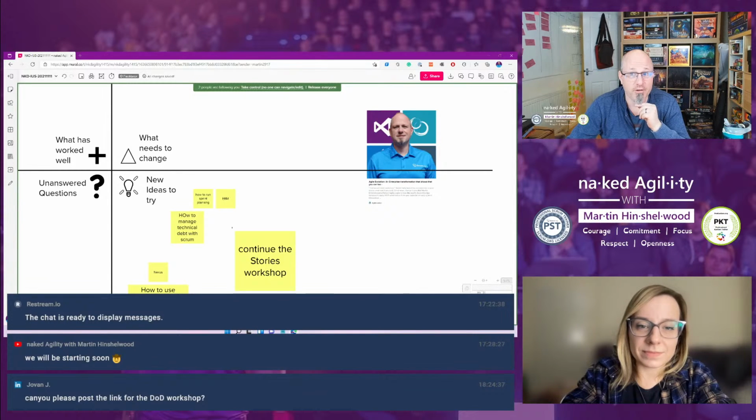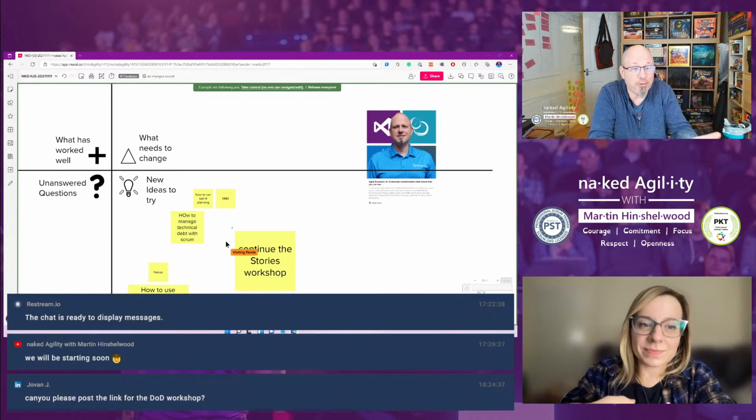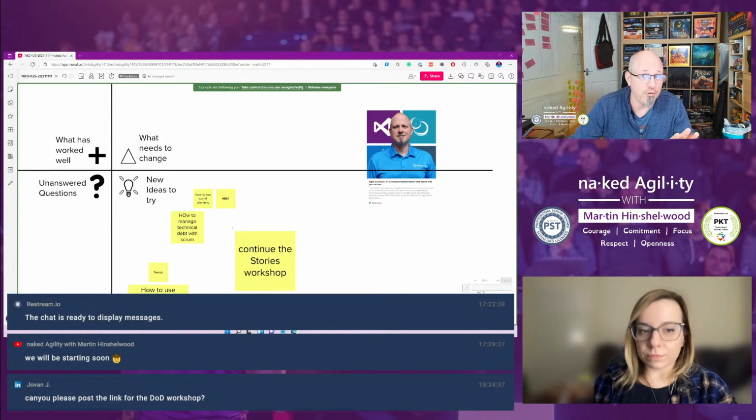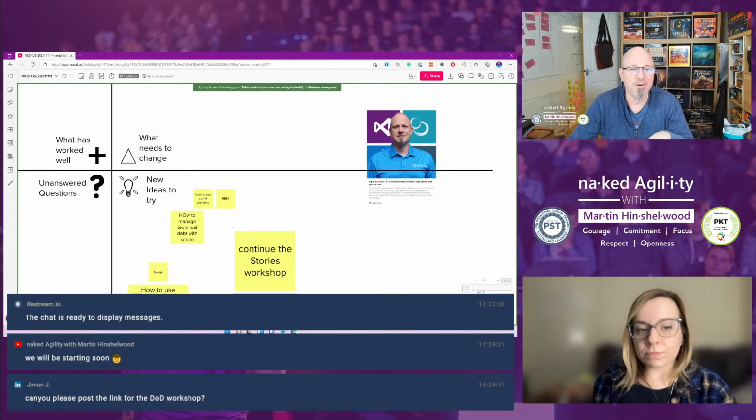Remember lean inventory control for your backlog, right? If you've got too many things on your product backlog, the product owner can't know everything. So if their accountability is maximizing the value, it can be very difficult to find it, like a needle in a haystack. Where's the value? I don't know, because there's 5,000 things in the product backlog. So definitely apply some sort of lean inventory control. You want a minimum stuff in there, just what you need. Maybe what you've got is what you have to have, but maybe it could be less, easier to understand.